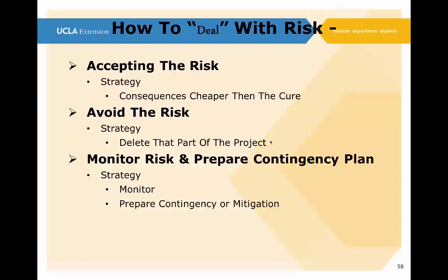That's your mitigation against the risk of having a collision which creates damage and which can cost you a significant amount of money. To mitigate that impact, should that event occur, you buy insurance. And that's your mitigation plan. And that mitigation costs money. And that money is represented by the premiums that you pay. So there's a specific example of where you would monitor a risk and have a contingency plan or mitigation.